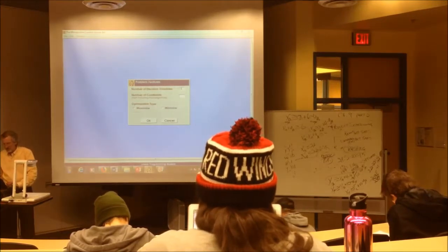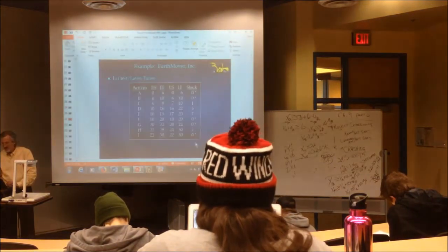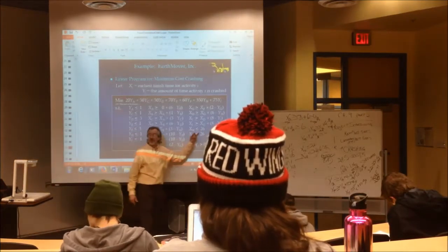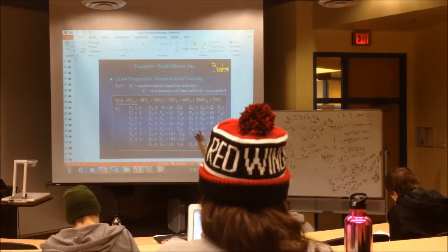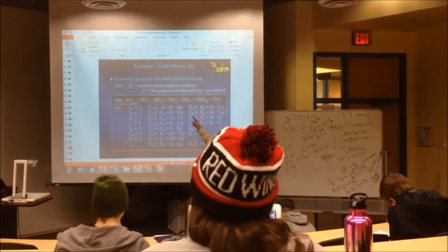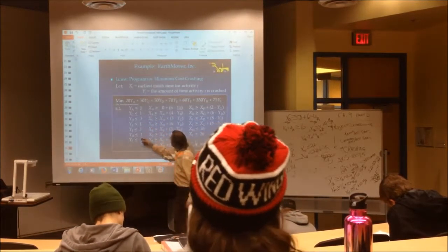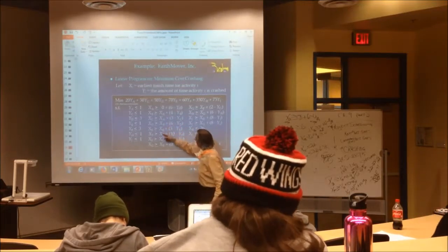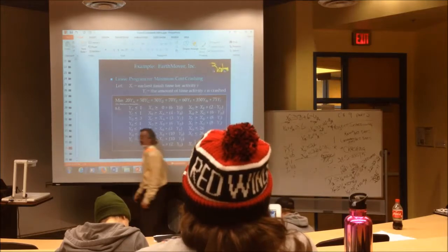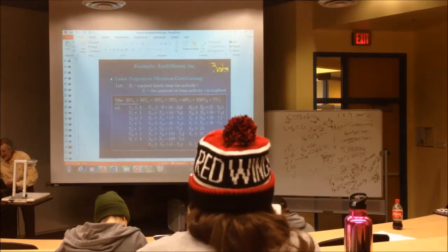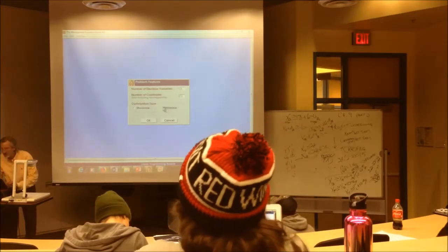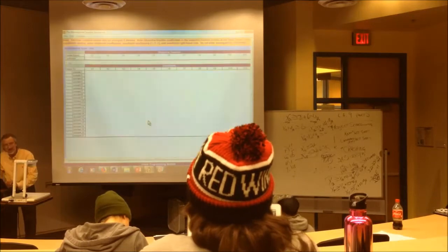Number of constraints. Oh boy. Hang on. You just got done doing all of this. Oh my God, you forgot these two. Almost everybody forgets these. Don't forget these last ones. You start counting. 1, 2, 3, 4, 5, 6, 7, 8, 9, 10, 11, 12, 13, 14, 15, 16, 17, 18, 19, 20, 21 constraints. Max or min? Min. Always on crashing, minimizing that cost.